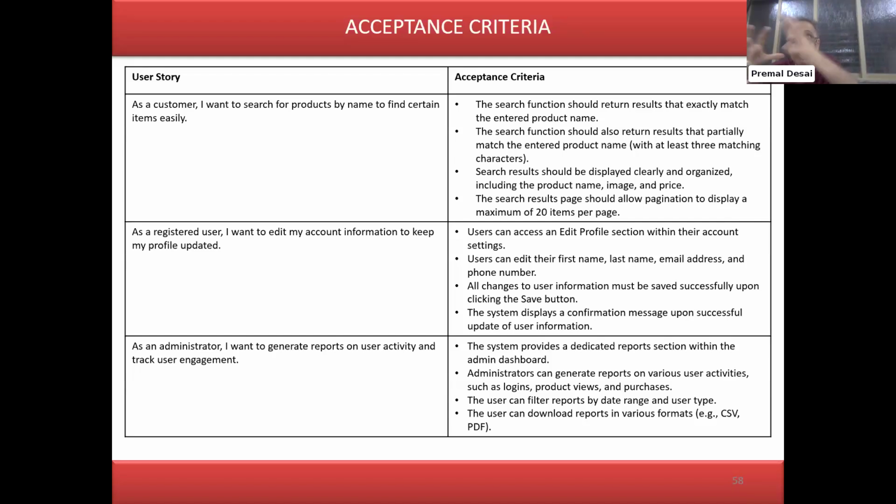When you amalgamate this, you put the test cases into a tool called Jira, and you link those test cases to a user story. You can correlate the quality of work of a user story to the test cases and see whether the user story is delivering quality output or not. Quality output in terms of how many bugs are identified when the test cases get executed through the CI/CD pipeline, what we call DevOps.